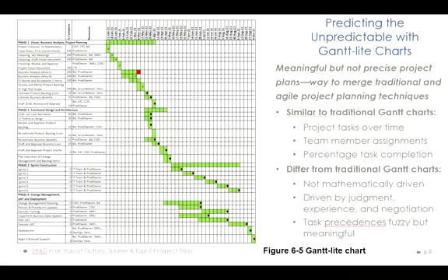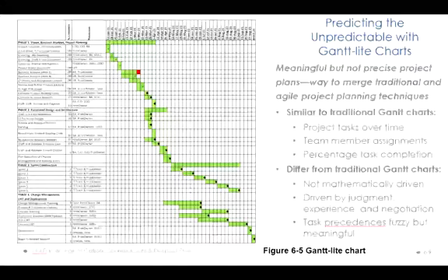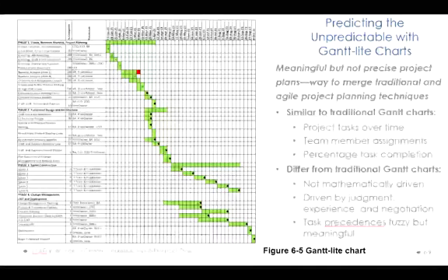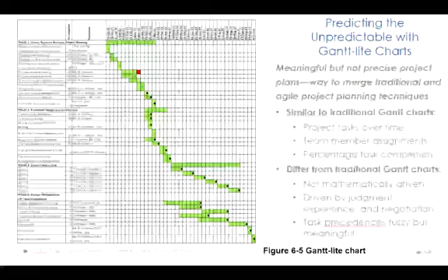As a matter of fact, this type of modified Gantt chart is also seen in the concept of PERT, CPM versus PERT. Without further explaining those project management concepts, basically the PERT method uses some sort of probability model to give you an estimate of how early or how late a particular job will be completed or delayed. Similarly, you can bring those probability concepts into the Gantt chart as well, even though the estimate of this type of Gantt chart is not as accurate as the PERT method.